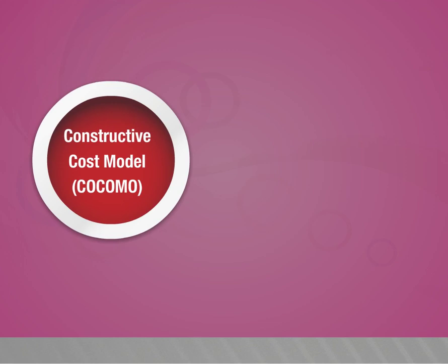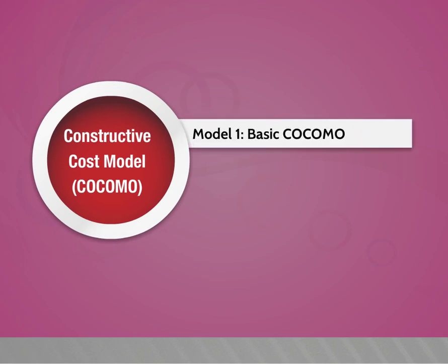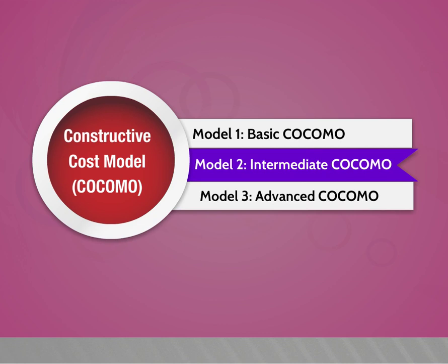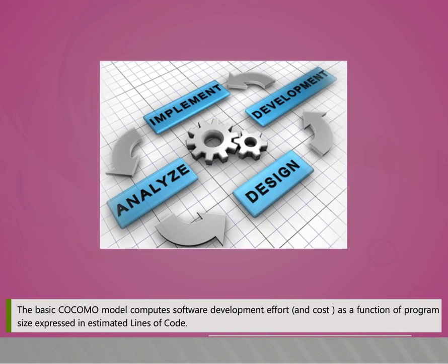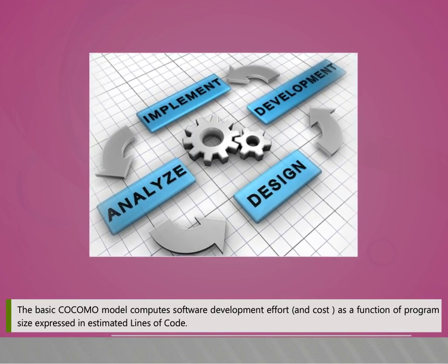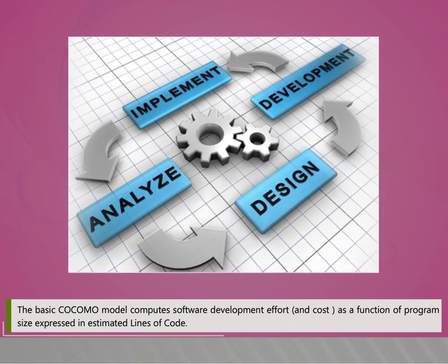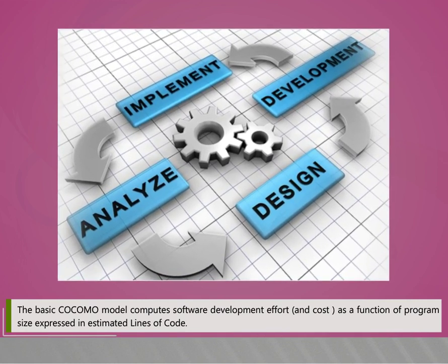Constructive cost model, that is COCOMO. Model 1, Basic COCOMO. Model 2, Intermediate COCOMO. Model 3, Advanced COCOMO. The Basic COCOMO model computes software development effort and cost as a function of program size expressed in estimated lines of code.